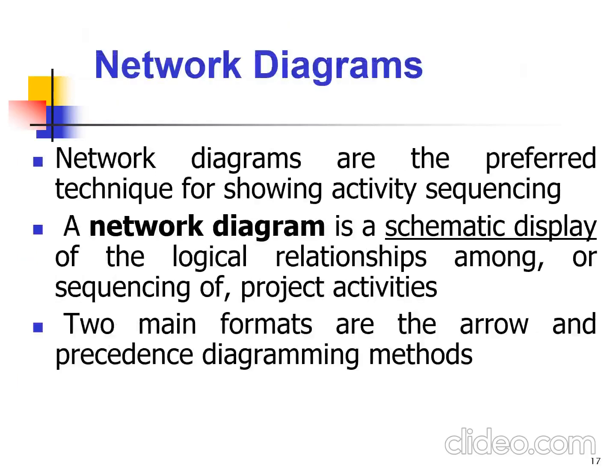So let us look at the network diagram. Network diagrams are the preferred technique for showing activity sequencing. A network diagram is a schematic display of the logical relationships among, or sequencing of, project activities. There are two main formats: the arrow and precedence diagramming methods.